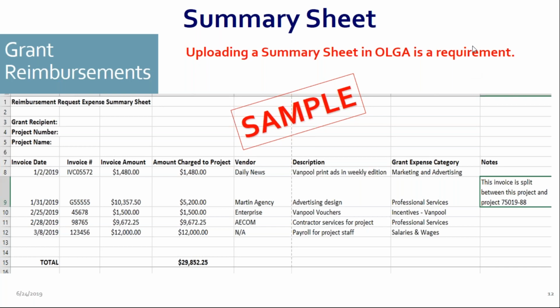We're listing all the items that you're invoicing on, and that way it's easier for accounts payable, who reviews this first at the RBT, and then the project manager, to use this as a guide for checking the payments behind it. There are numerous other ways of creating a summary sheet, and you can certainly work with your project manager to do that. Sometimes even listing the items that you're billing but also putting a page number of where you can find the details is very helpful.